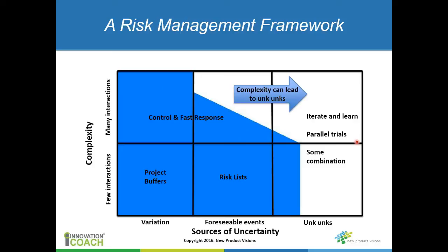So you really have to start here with this risk management framework and think about your project. And again, to reiterate, you don't just look at this for the project in total, but you've got to look at it in the context of the individual sub-projects. However it makes sense to break down the development, you have to think about it. It might be related to the market, it might be related to technology, it can be anywhere within the project. And secondly, this risk profile will change as the project unfolds, and you have to accommodate that. So it's a very dynamic situation. But I think this is where you really need to start.